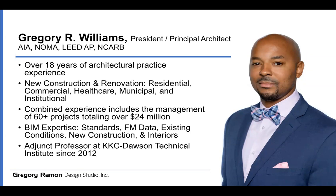So after the design process has been completed, and this depends on the project too, because sometimes on residential projects, we may not be paid to continue providing construction administration services, but our role from a contractual standpoint is, and what that falls under is construction administration, means going out to the job site, doing observations to see if the construction is being done in accordance with the drawings.